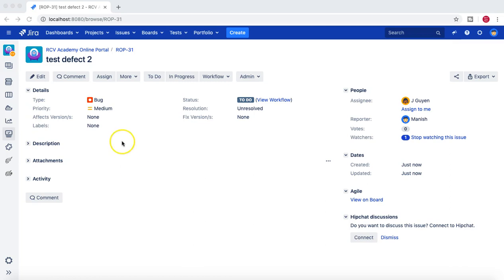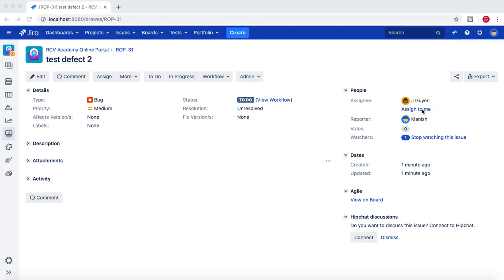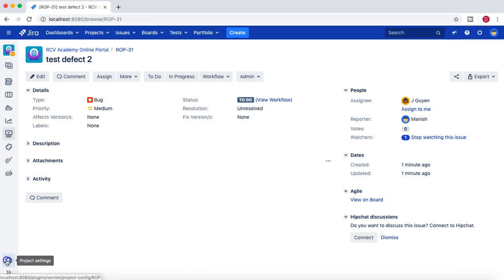Once the issue is created, you can see that 'test effect 2' got created and the assignee is Jake. So previously there was no assignee because the default was unassigned, but now that we've changed the project settings, whoever is the project lead will be assigned the issues created in this project.